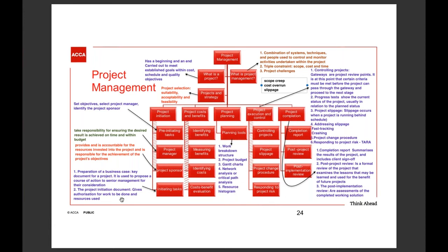So when it comes to the project initiation document, basically what you need to have inside there will be the project title, project purpose and objective, project start and end date, details of the project sponsor and project authorization by the main stakeholders. And you may also want to include an outline of the schedule of work, budget information, an outline of project scope and work sequence, or details like the roles and responsibilities of whoever is involved in that particular project.